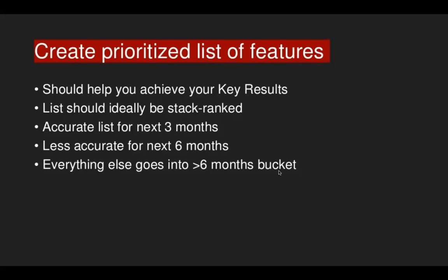Those you don't touch. Focus on the things you've prepped for 3 months, because usually as a product manager, you should have at least 2 to 3 sprints, which is about 2 weeks of work each. So 3 sprints would be what? A month and a half. Great product managers will have about 3 months of work already done. Prioritized, every feature and everything in it is there. So when it comes to dev time, there's no playing around. You always have work done, so you can have your team working on only things that are adding value.